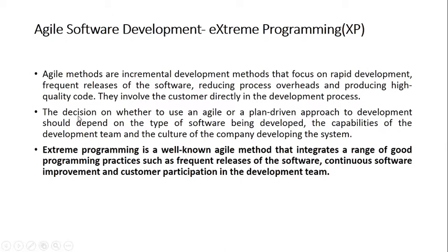Now, which approach to use? The very basic question that comes into our mind. The decision on whether to use an agile or a plan-driven approach actually depends upon the type of software being developed, the capabilities of the development team members, and the culture of the company developing the system. So there are three basic criteria that have to be considered. First is the type of software. That means if it is medium or small scale, we can go for agile, and if the customer is committed, then also we can go for agile, else we go for the plan-driven approach.